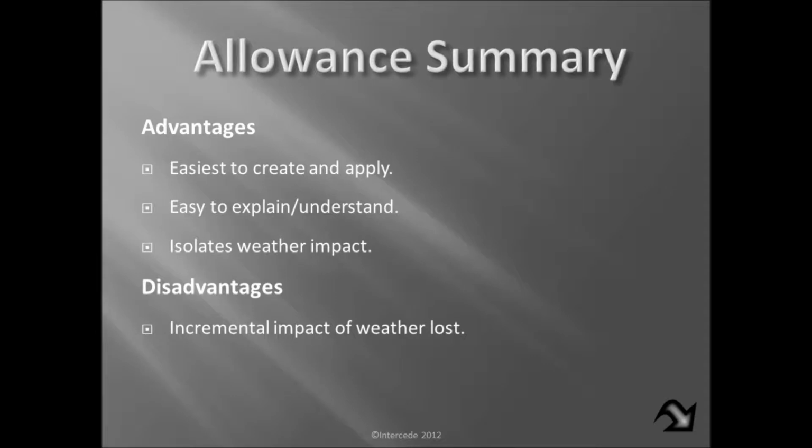The disadvantage, of course, in my mind, is that the incremental impact of the weather is lost. So for interim milestones before the end of the project, there's no way to really determine what their expected finish date might be if accounting for weather.